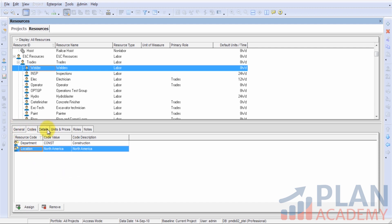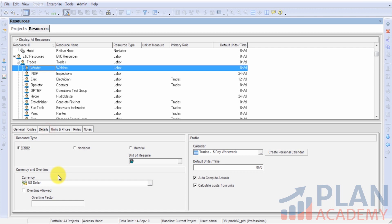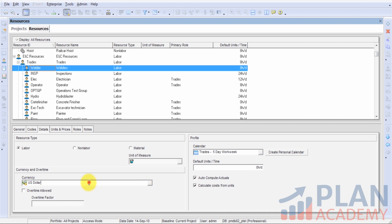Let's go to this details tab. On the details tab, the first thing we want to make sure we've set properly is the resource type. I am working with labor right now, so the default is labor, and we're going to leave that as it is. Also, Primavera has support for multiple currencies, so here you can enter the currency for which you want to track this resource's costs.